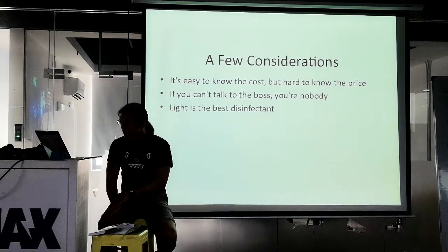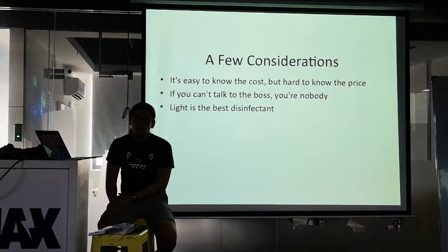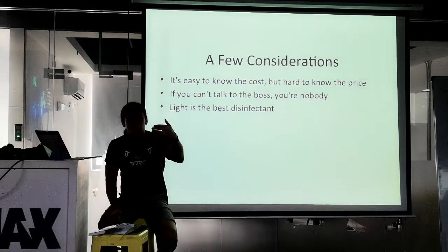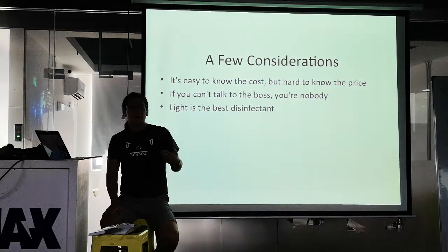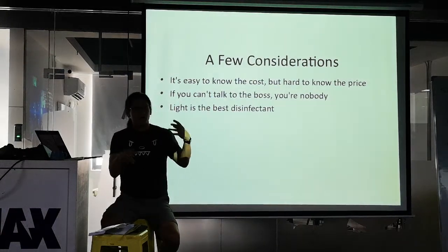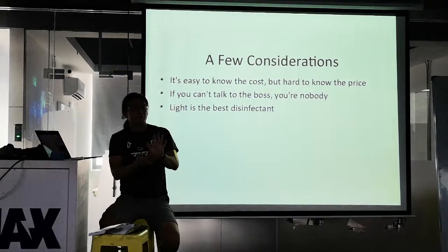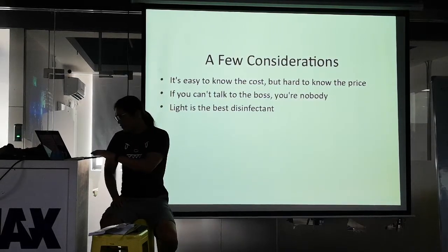And transparency is good. So when you get your bill of materials quotation, if they're willing to sort of line by line show how much something costs, what goes into the product, that's a good sign. If they just say, here's your cost price, no breakdown, then that's a bad sign because they can go ahead and just hide costs inside the product. They're just trying to make money that way.